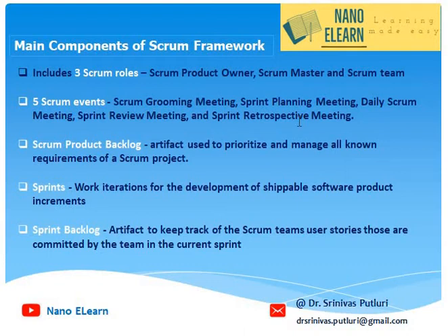And after everything is done, before shipment of the product, a sprint review meeting will be held to understand whether we are going ahead to ship this product or not. And after making a decision and shipping the product and deploying it to production, at the end of the sprint and before the beginning of the next sprint, a sprint retrospective meeting will be held to discuss what went well in the current sprint, and any challenges or lessons learned that can be taken up to the next sprints.